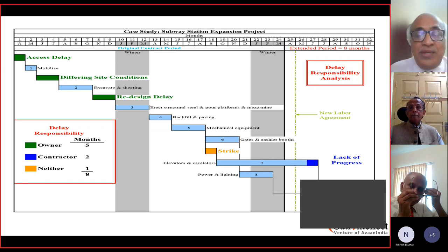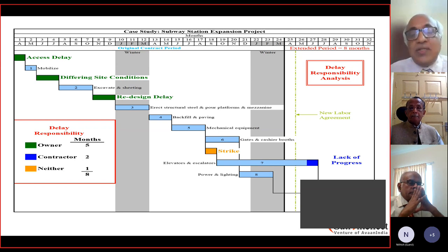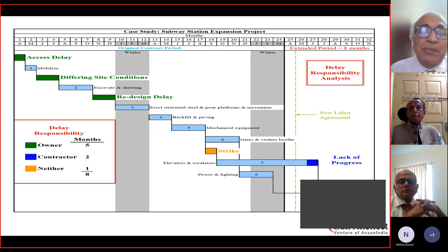It could be based on the percentage of total value. Suppose I know that the profit is 10%, I could say that the maximum deduction can be to the extent of 3-5%. Or there could be a cost plus where I know this is the management fee or this is my profit. So that ultimately it doesn't happen that over and above all the material, labor, everything, the contractor also lands up paying an extra amount for all these penalties, which is obviously not viable.